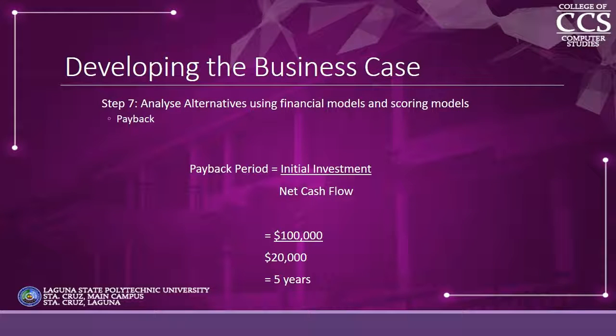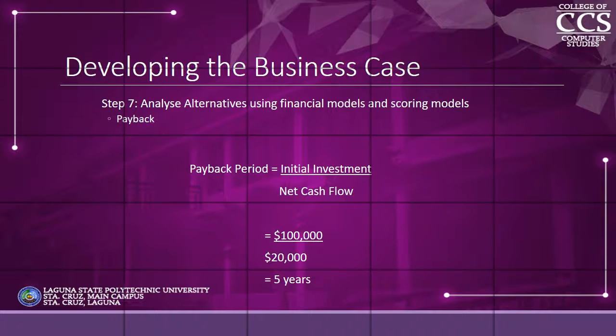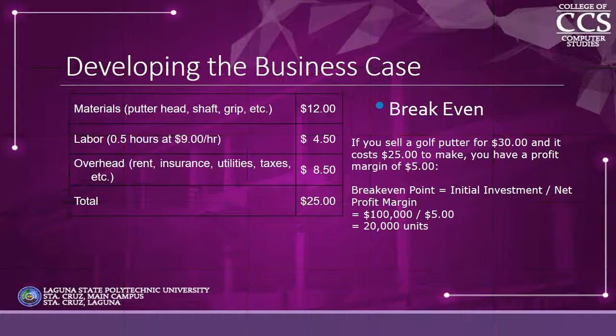It must compute payback. The payback is equivalent to initial investment over net cash flows. For example, you have 100,000 as initial investment and your net cash flow is 20,000, meaning you are going to have a payback after 5 years.